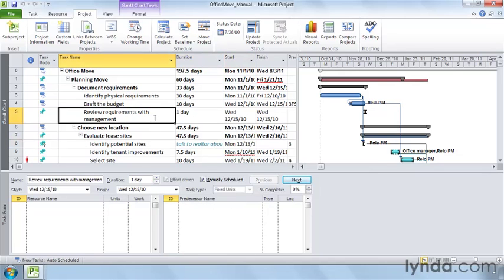In some cases, tasks have to occur on specific dates, like meetings, training classes, and conferences. Those tasks start whether you're ready or not. You can type the dates in the start or finish fields of a manually scheduled task, and that's when the task is scheduled. This approach is also an easy way for a beginner to start managing projects. You can create tasks and set their start and finish dates without learning about task dependencies, date constraints, and other